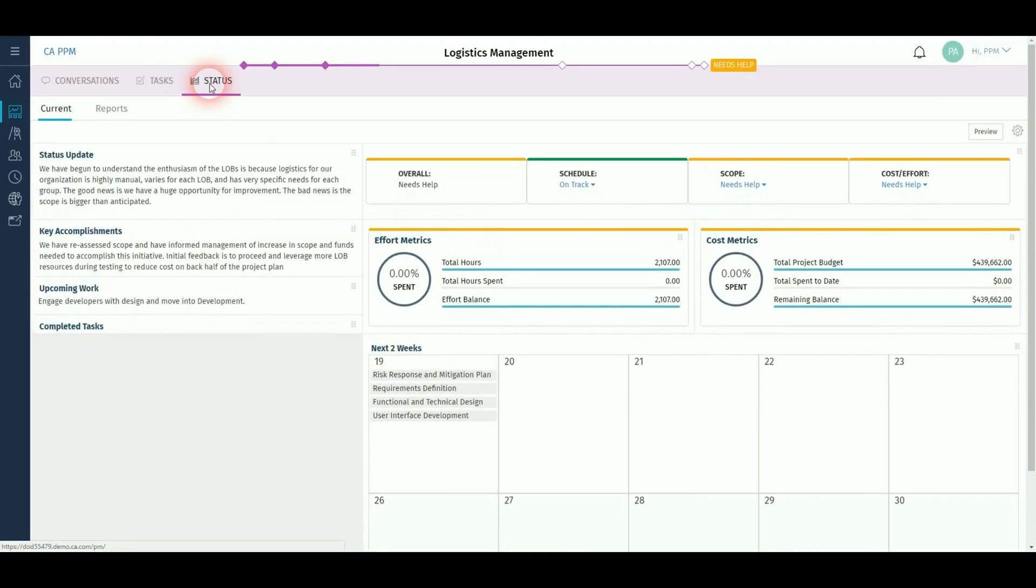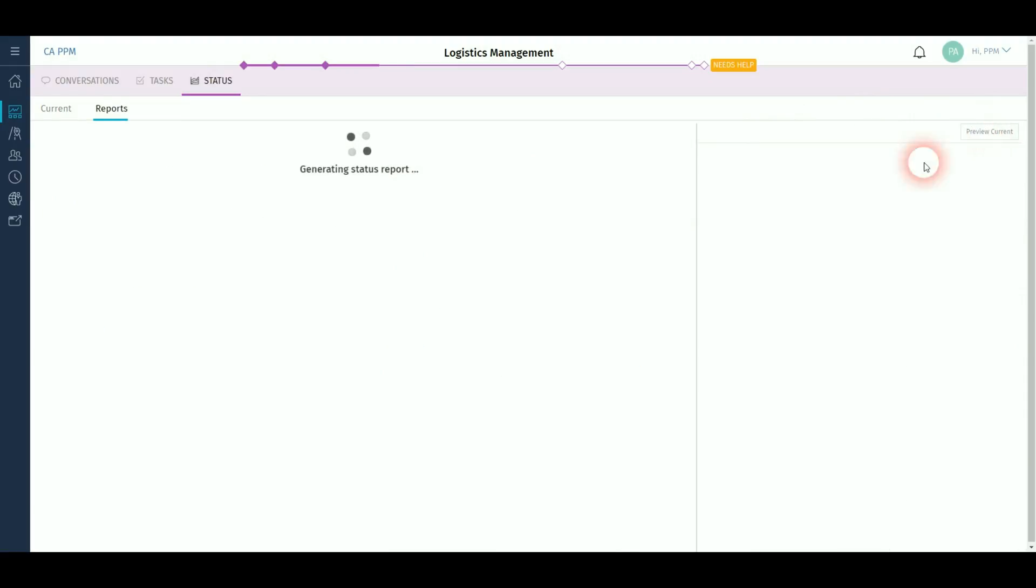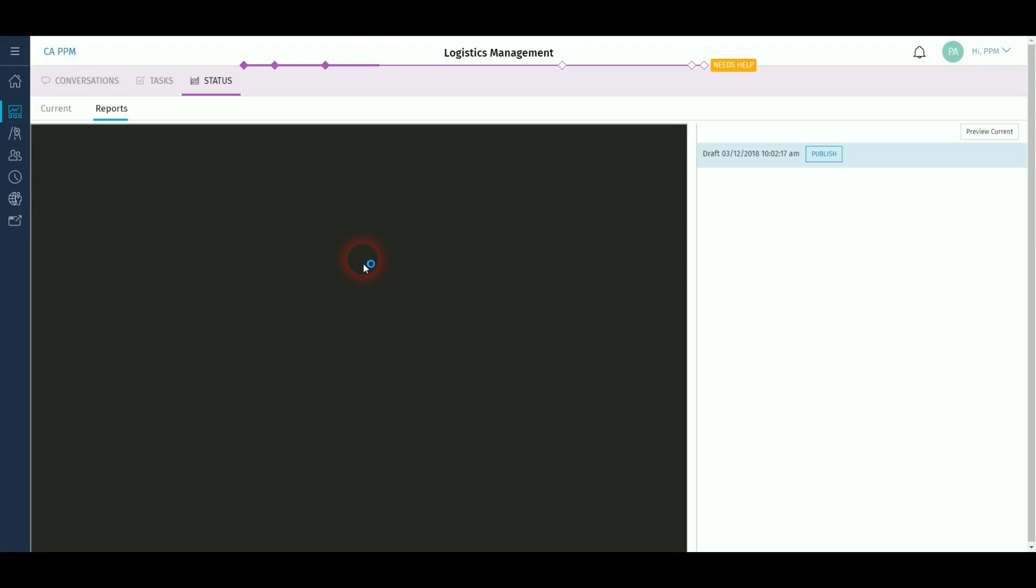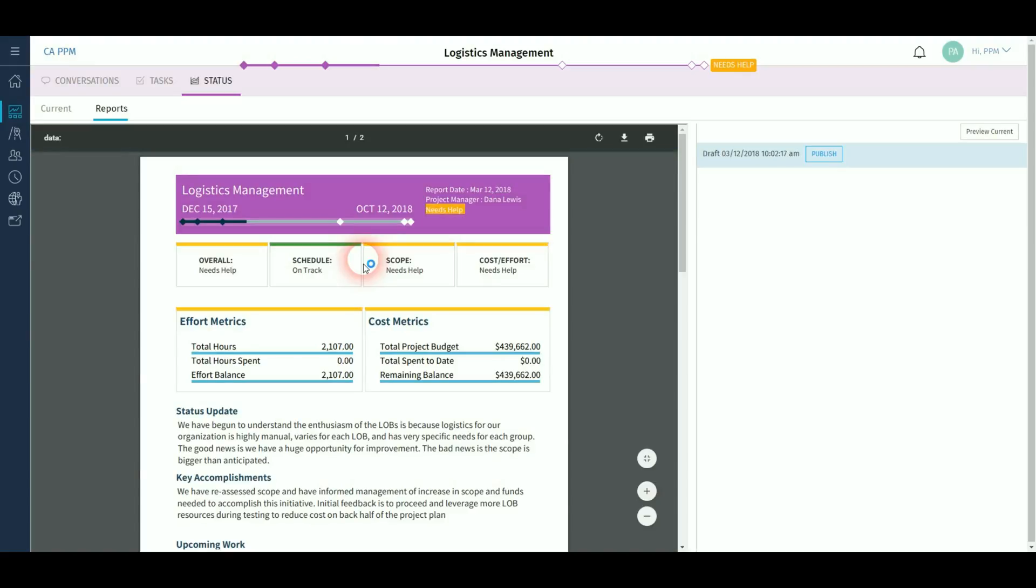Status reporting allows you to record narratives and KPIs for each week or month against your project. You can then preview this as an inline report and once this has appeared, you can then publish and send to stakeholders.